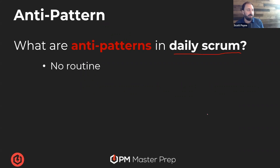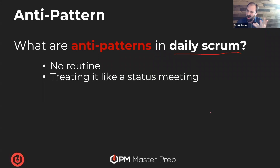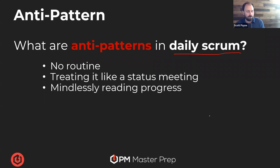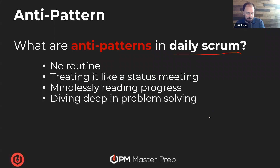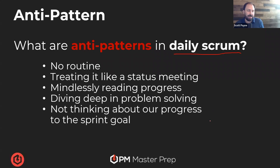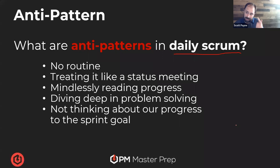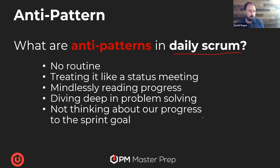So if we wanted to screw up a daily scrum, very easy to do. All you got to do is not have a routine — that's an anti-pattern that will put you into the rocks. Treating it like a status meeting with no heart, soul, and connection. Mindlessly reading our progress — that's an anti-pattern. Deep-diving into problem-solving and not being respectful of people's time. Or not thinking about our progress to the sprint goal and just floating out there. There are many more infinite anti-patterns for hitting a daily scrum in the bad way.